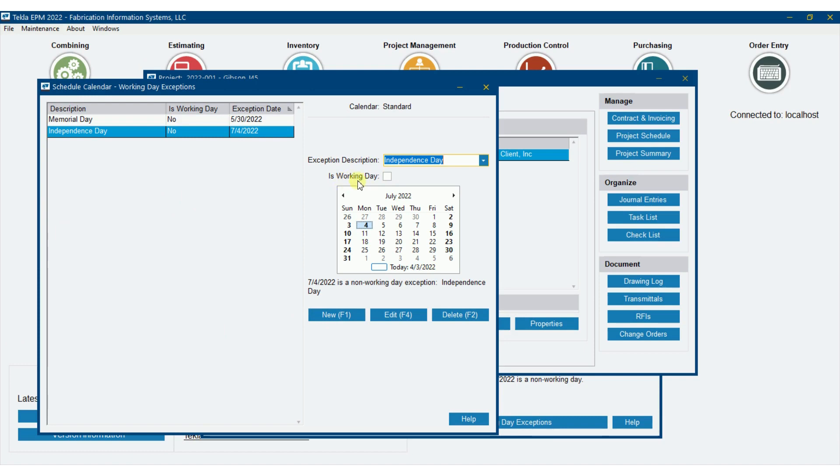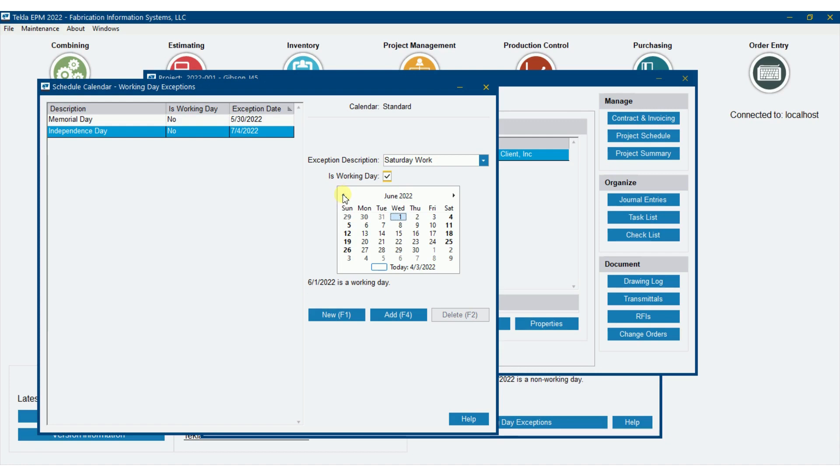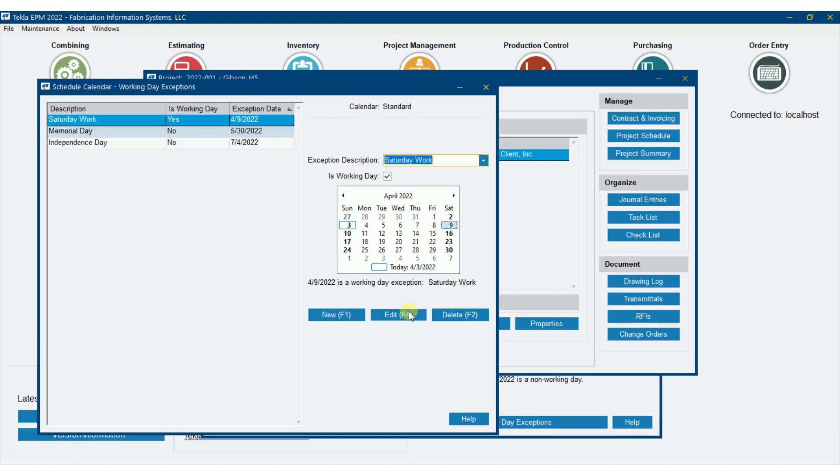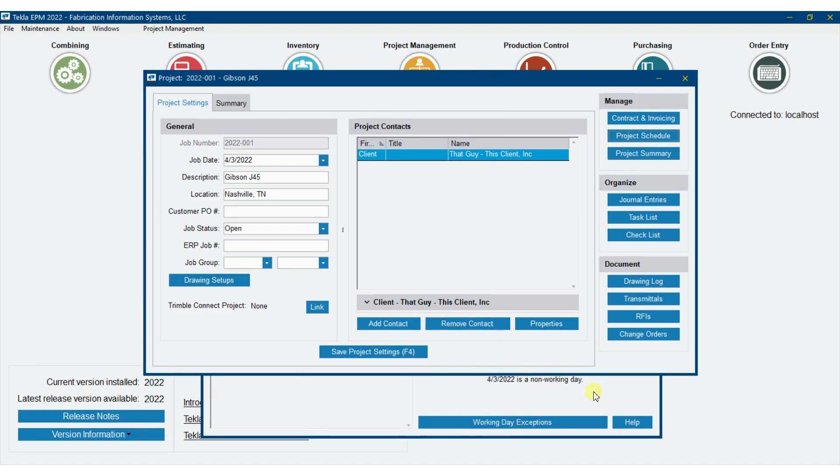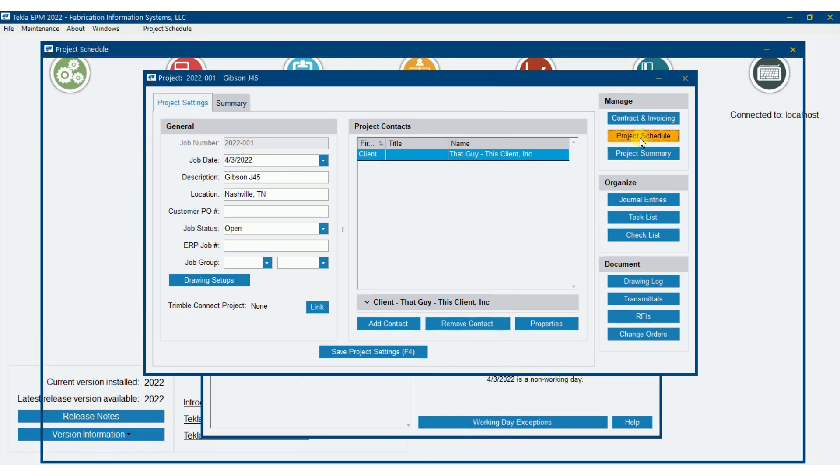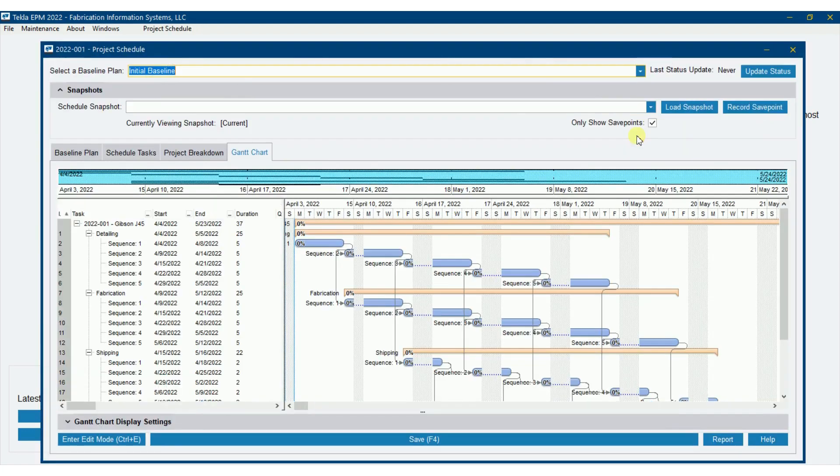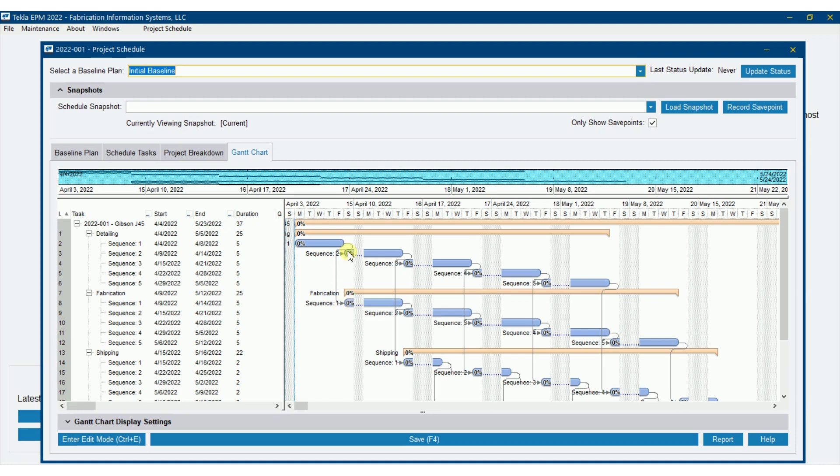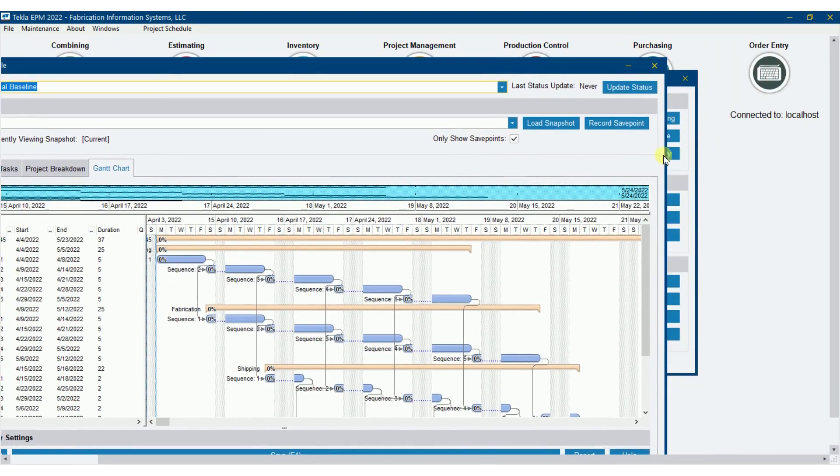But now, notice also there that I can check this as is a working day. So I'm going to put in a new one here and we'll say Saturday work. I'm going to say it is a working day and let's just say that the week of, so we're right here today, let's say this coming Saturday we're planning on working. So we're going to add. Let's go see what that does to us here. So if I go back over here to my schedule, you're going to see that this coming Saturday is not grayed out anymore. And it actually planned some time for these tasks on that date.